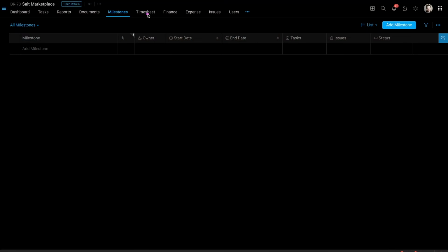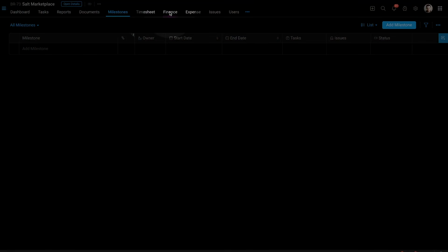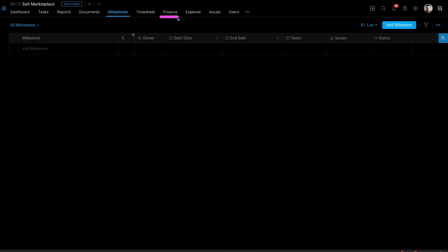So let's say, for example, you didn't bill at a fixed rate, you billed by the hour. You could actually record all the time spent on a task, and then you can mark it as billable or non-billable right within Zoho Projects. And then from there, this is a perfect tie into the next tab here. You can actually bill it through Zoho Books using the Finance tab. That's the power of Zoho Projects in the Zoho ecosystem, is that you can bill that. So you have the integration between Zoho CRM, Zoho Projects, and then Zoho Books.